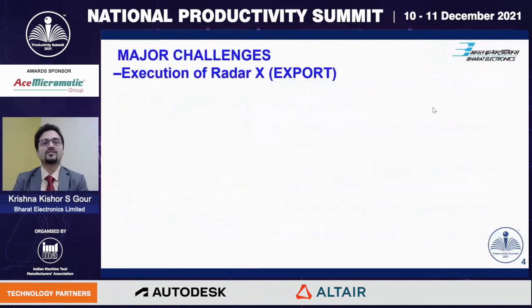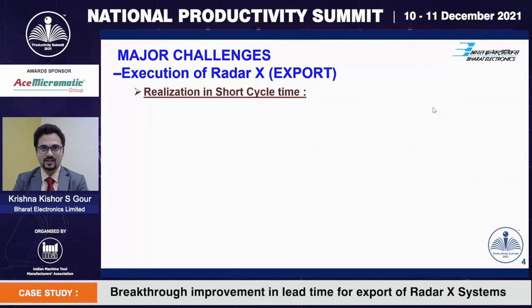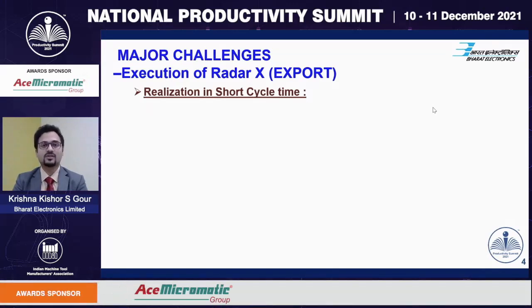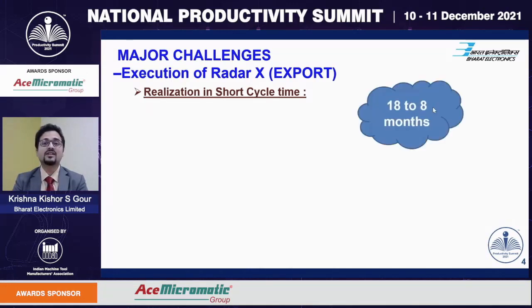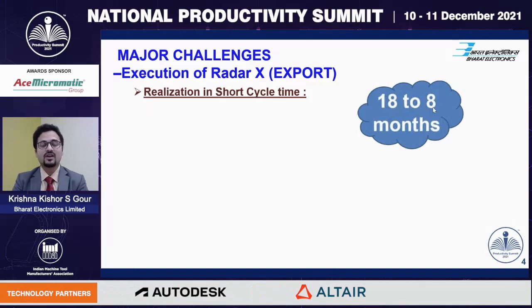The crucial challenge of bagging an export order for an indigenously developed defense equipment system was met. However, major challenges lay ahead. The standard lead time for manufacturing 4 numbers of radar X as per the contract was 18 months. However, the customer requested an early delivery. Considering the geopolitical situation in and around the country of the customer, the request was honored. The drastic reduction in cycle time from 18 months to 8 months was a major challenge for us.